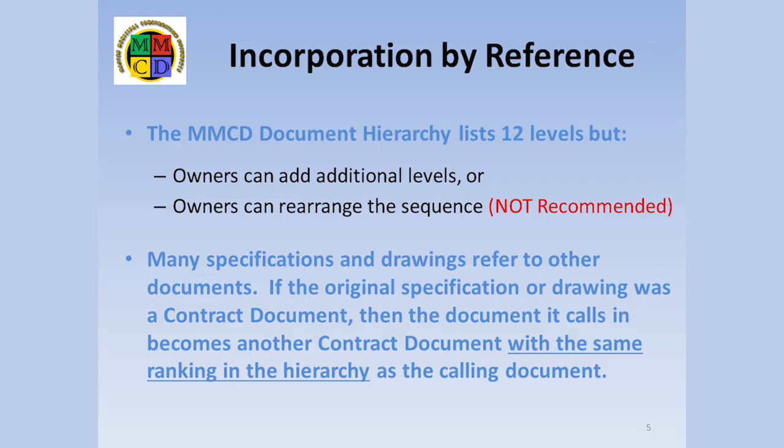So in this example, if a drawing called up a CSA specification, that CSA specification would rank as a drawing, not as a specification.